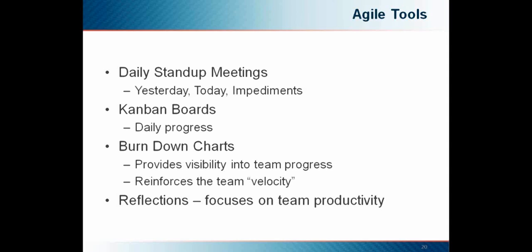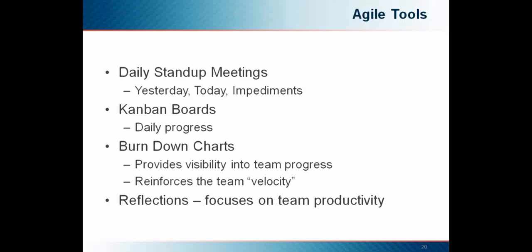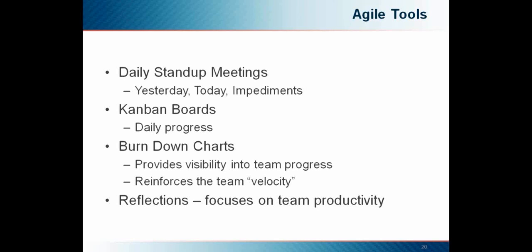And at the end of each iteration, iterations are referred to as sprints in Agile terms, we do a reflection to identify any sort of improvements, remove roadblocks and bottlenecks. Team members will come with a list of what went right, what needs improvement, and any suggestions. The list is prioritized, and the improvements that the team feels they can do for the next sprint are implemented.